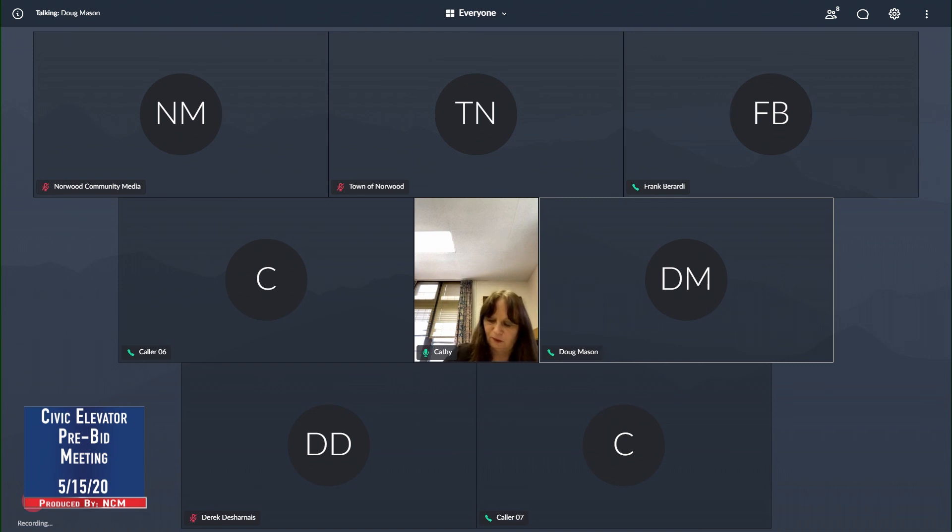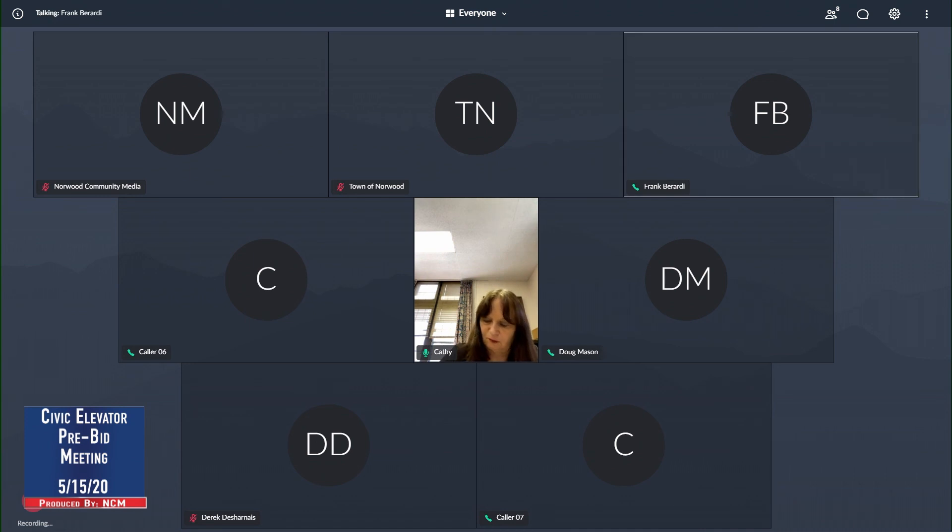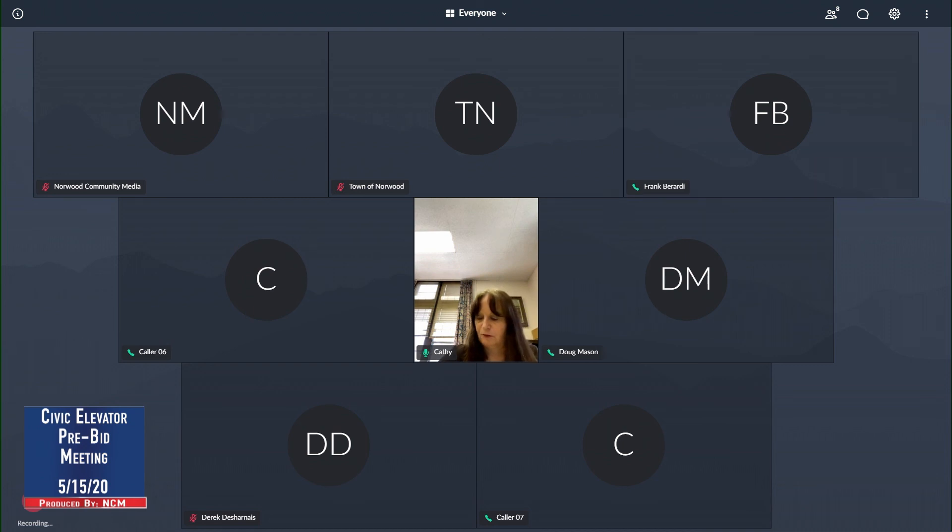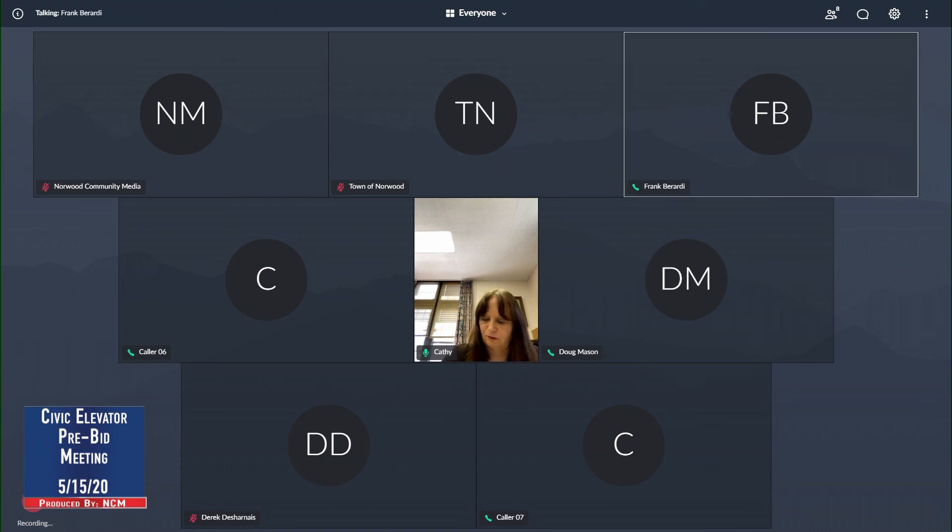Yeah, so what we're looking for, we're just looking for the panel, strictly for the recall. So, that'll be tied in. You'll bring the connections to the module in the elevator machine room, and it'll tie into their controller there. And then we're looking for that panel to be picked up by the last zone that's available in the fire alarm system itself that they currently have. That's it for me. Thanks.